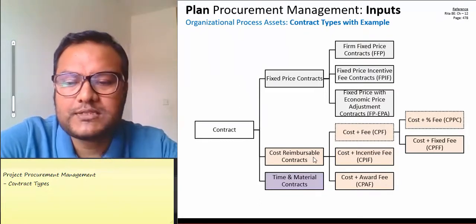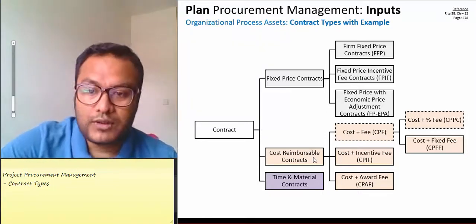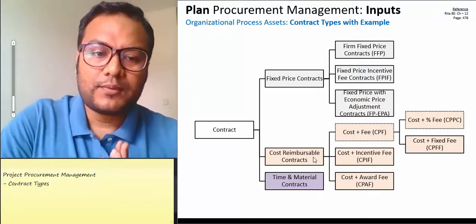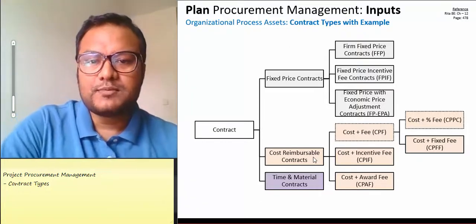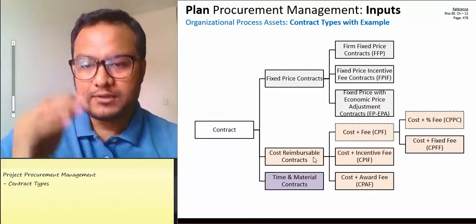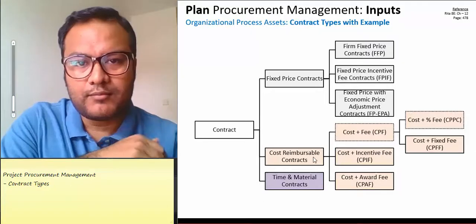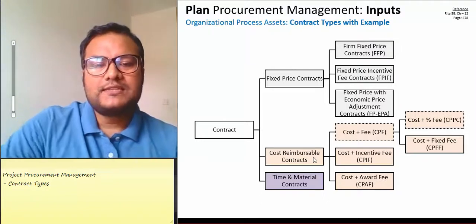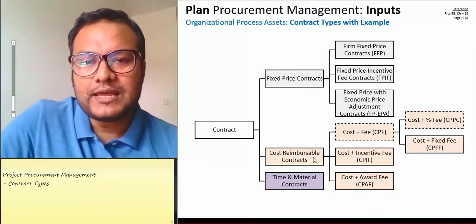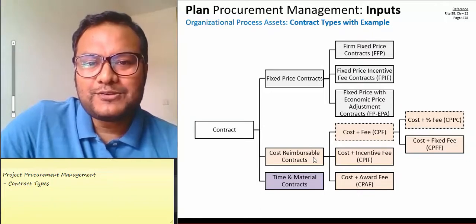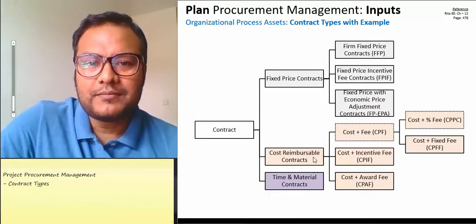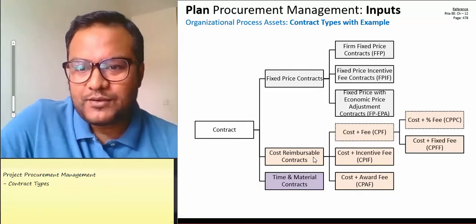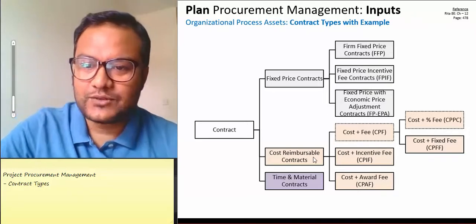Now we come to cost-reimbursable contracts. Unlike fixed price, with cost-reimbursable we cannot really know the total cost upfront. In a cost-reimbursable contract, the buyer reimburses the supplier for all legitimate costs. For example, if the vendor builds a table, the legitimate costs — such as wood and materials — must be reimbursed. Non-legitimate costs are not reimbursed.